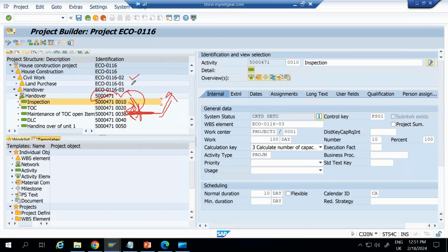And let's say land purchase. Land purchase is a direct procurement process where in most cases you will not have a purchase order, because you are doing mutation registration only, right? So in that case, the direct posting will be done in the finance FD60 transaction. You can use it to post directly, and then your cost will be incurred on this WBS element. Once your house is finally constructed, which is your asset, the total cost will be settled to the asset. So monthly settlement will happen from WBS element to AUC, and then AUC to asset will be settled once your final product is ready.